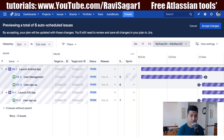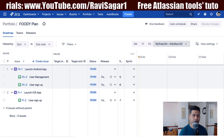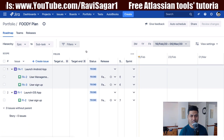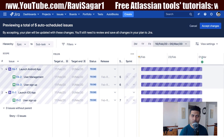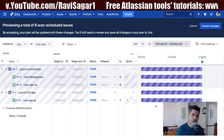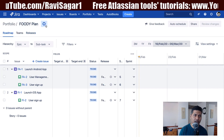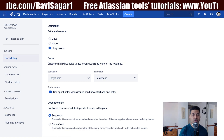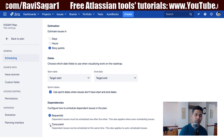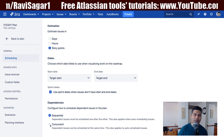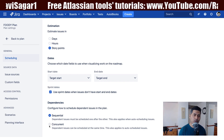Now if I go back to my plan and click on the 'Auto Schedule' button, it will do the scheduling for us. I need to do a refresh since I just saved changes to my Jira issues. If I click on the auto schedule button now, hopefully it will schedule everything in parallel. You can also control this when working with the portfolio plan — if you go to the 'Configure' option, you have the option to manage dependencies and allow concurrent dependencies, so you don't have to wait.